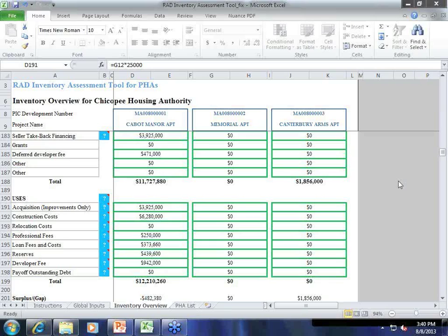In addition to that, you need a letter from a tax credit investor saying that they have looked at your numbers and that, however that's worded, they think the deal's feasible and that they'd be interested in it. Right. And that's just the letter of intent that the investor needs to sign, and that's the template form that's the second or third workbook in the worksheet in the application.